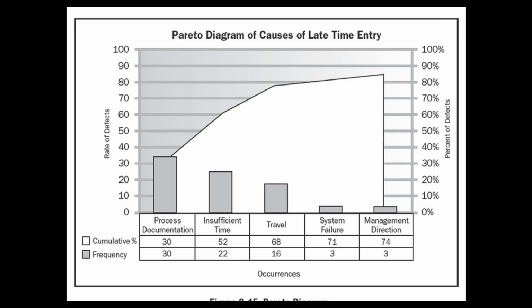The 80-20 law says that 20% of the reasons are responsible for 80% of the problems. Meaning what? 80% of defects are due to 20% of reasons. So if we look at the categories, if I can address 20% of the categories, probably I will be able to fix 80% of the defects. So we should address the highest value categories first and achieve greater benefit in a shorter period of time.